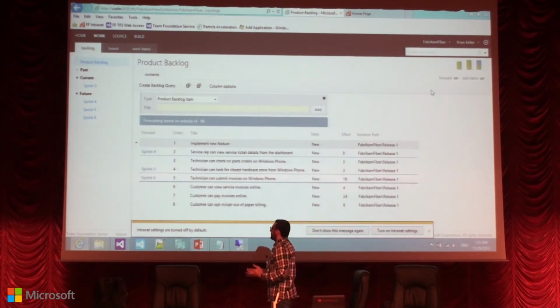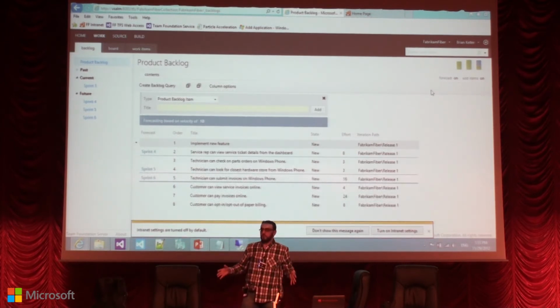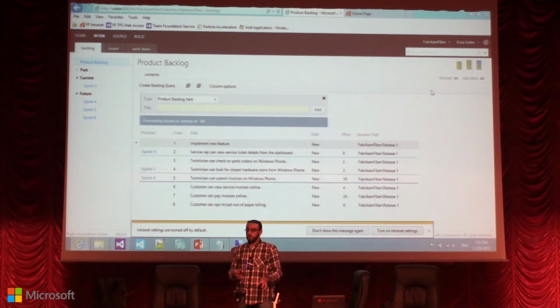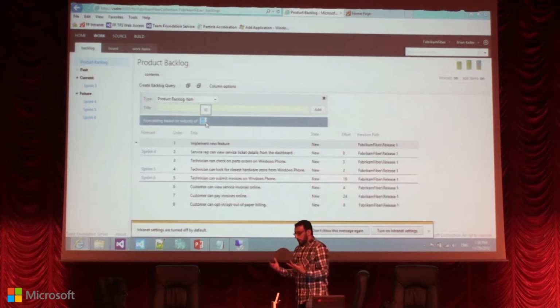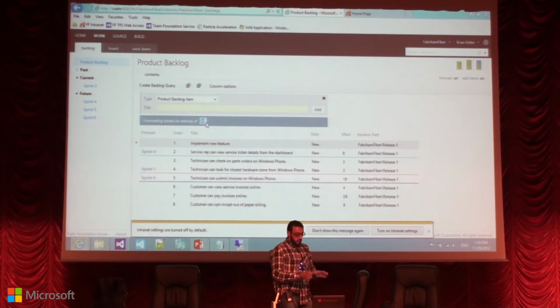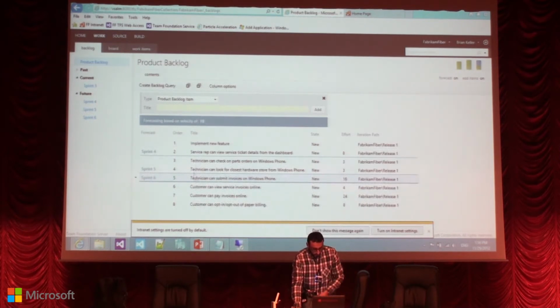So as we said, we are using Scrum, and Scrum is based on multiple sprints. So you define iterations, and for each iteration you say, I'm going to build this set of features, and the other features will be built in future sprints. I can see, based on the velocity of my team, and velocity here means the amount of time your whole team will work on this project, whether I'm satisfied. If you see that you will be late, if you have this feature in sprint 5, you can go ahead and move it to another sprint.